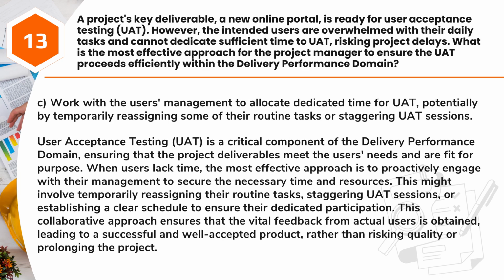Answer: C. Work with the user's management to allocate dedicated time for UAT, potentially by temporarily reassigning some of their routine tasks or staggering UAT sessions. User acceptance testing, UAT, is a critical component of the delivery performance domain, ensuring that the project deliverables meet the user's needs and are fit for purpose. When users lack time, the most effective approach is to proactively engage with their management to secure the necessary time